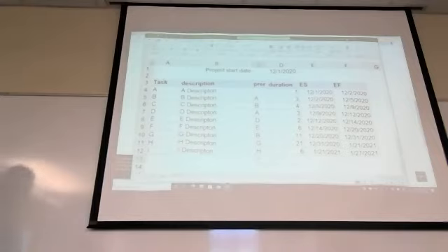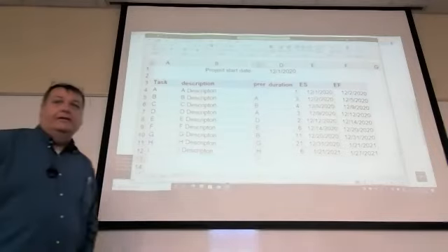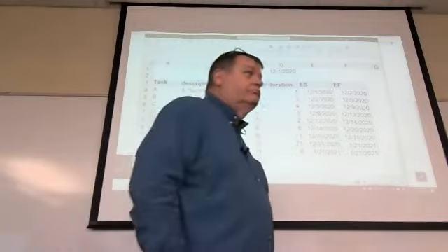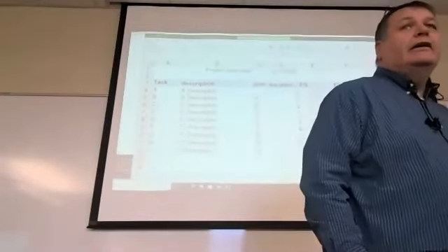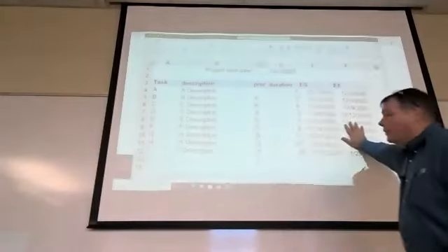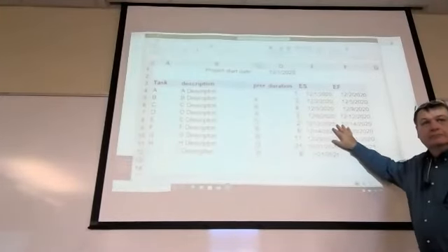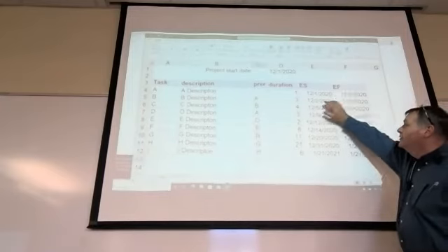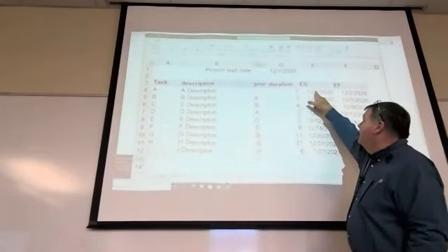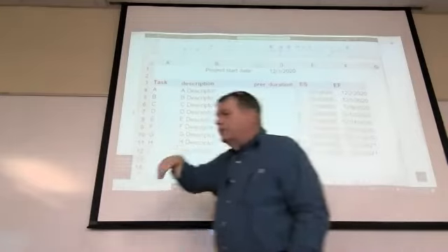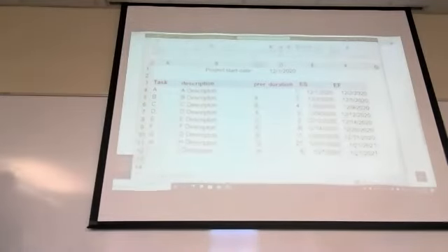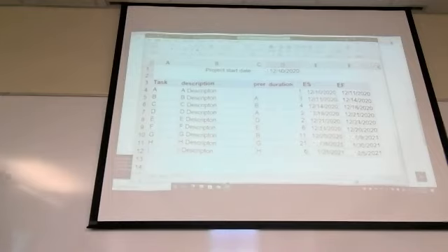Now, give me dates for these. This is where it gets complicated. The math is all wrong here. The first cell's right, because there's no prerequisites. We start on that date. And that was the other thing I meant to show you. So if I go up here and I change this date to 10/10 or 12/10, it shifts all the dates automatically. And that's what we want to have happen when we set this up.